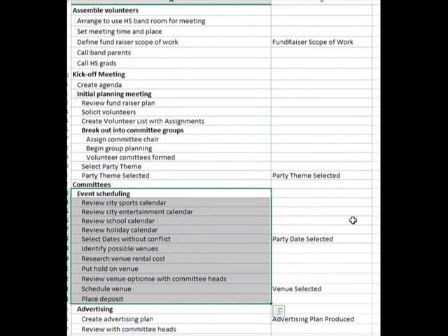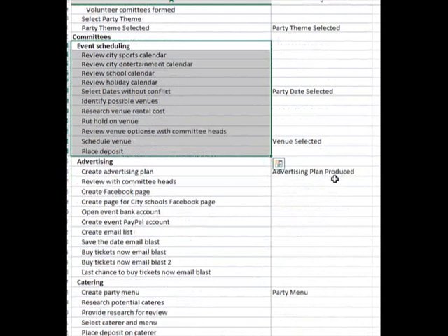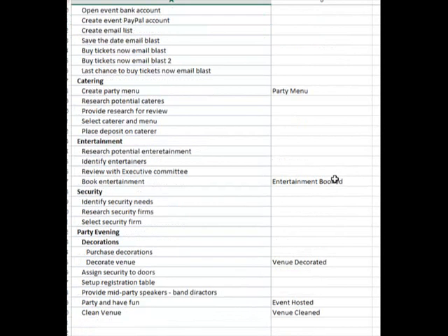And again, each of that work results in a milestone or deliverable. The milestones or deliverables track back to the charter, and as we're doing the detailed planning or bottom-up planning, we may define new milestones or new deliverables that we had neglected to include in our charter.